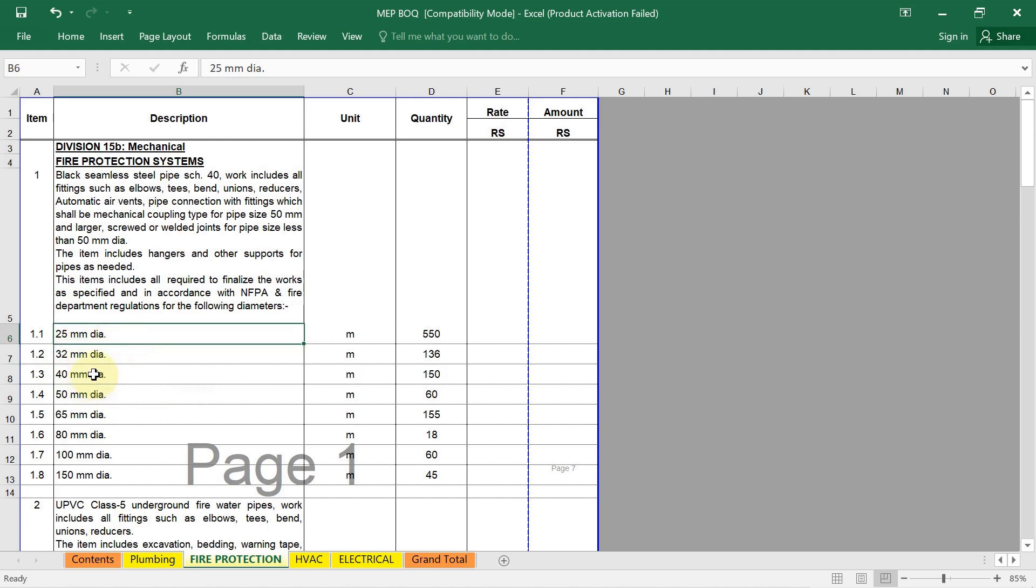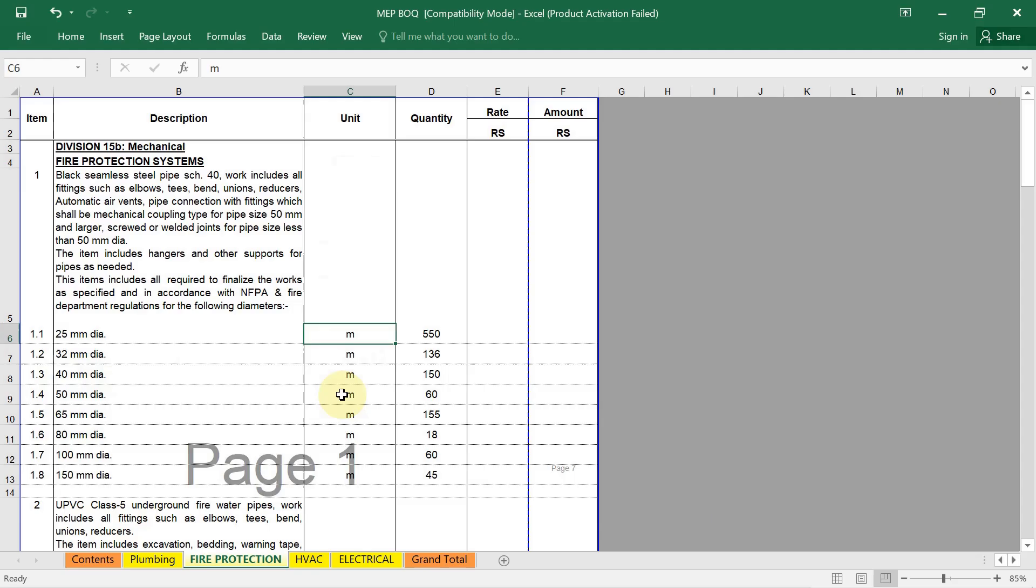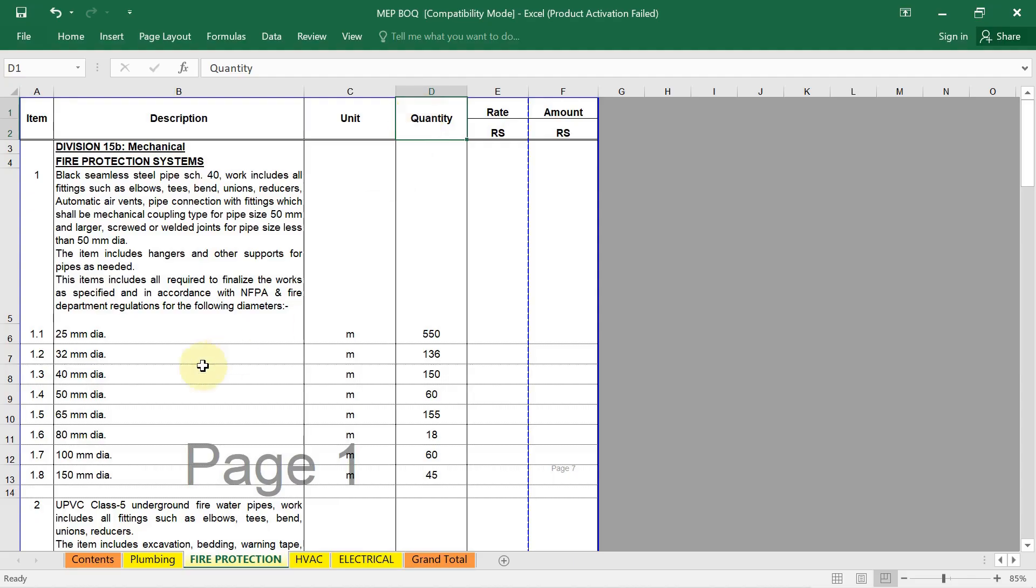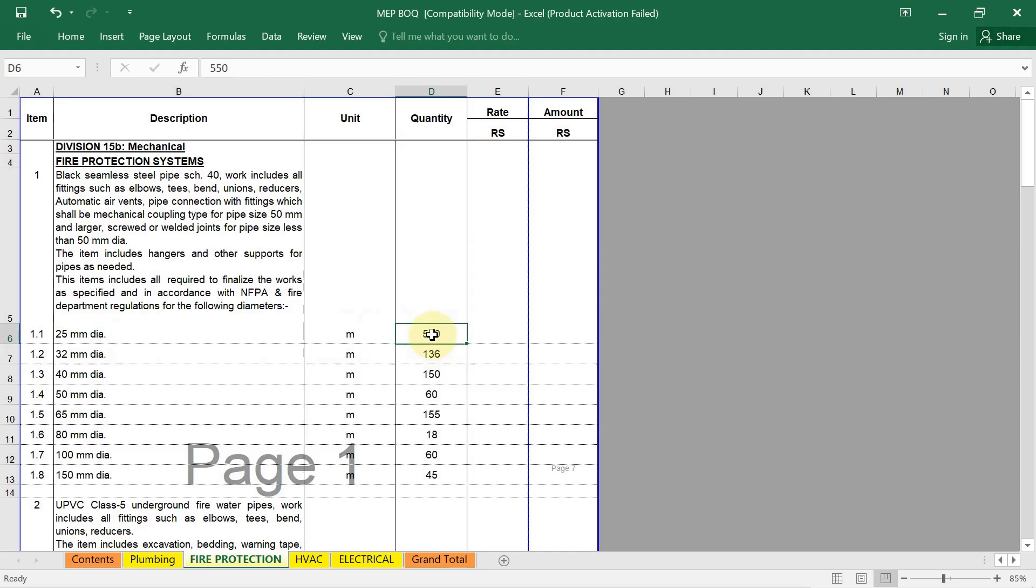Simply, how much diameter pipe you are using in your project. In the second column, you have unit of measurement column. Here you have to specify the unit of measurement for each item. For example, for pipe, the unit of measurement is meter. Same way in the next column, you have to enter the calculated quantity for each item. For example, here in our project, if you have a 25mm diameter pipe, how much total quantity pipe we have? 550 meters of 25mm dia pipe we have in our project. Whatever quantity you have got, you have to write down.